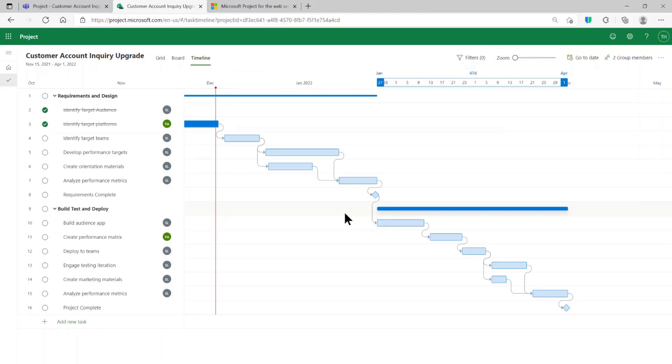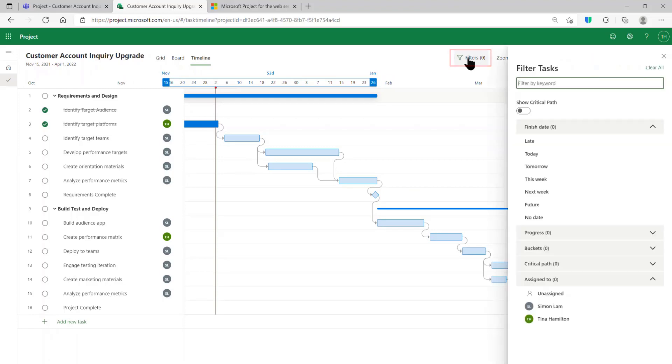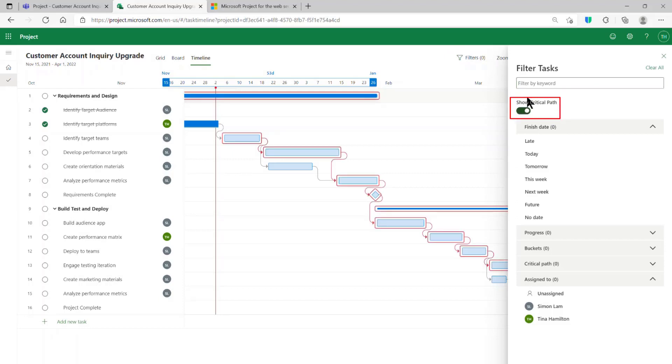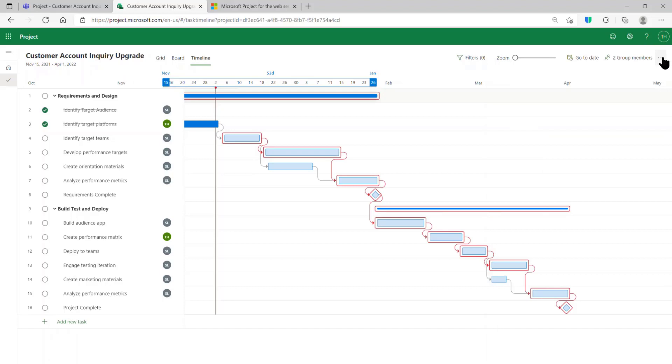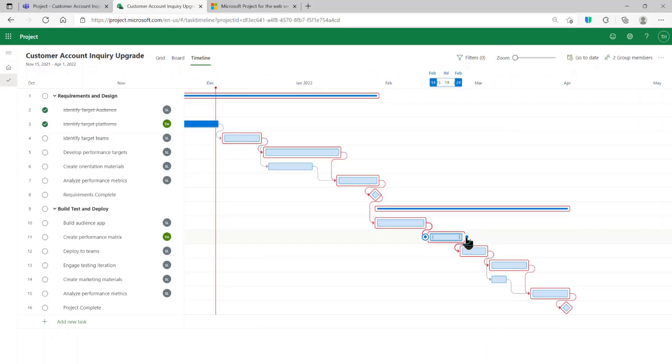In the top right-hand corner, click on the Filter button. This will open up the side menu and allow you to click on the Show Critical Path toggle. This highlights the critical tasks in red.